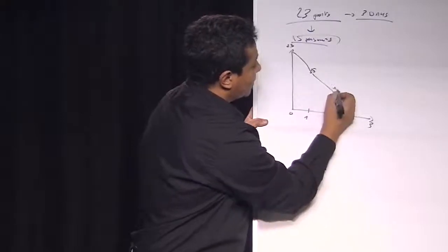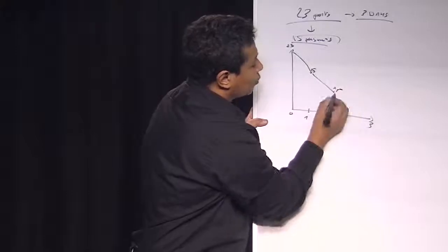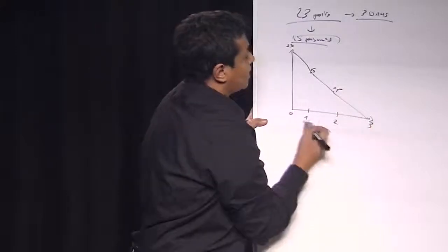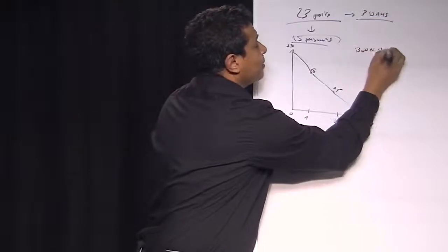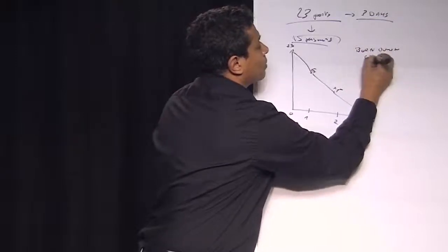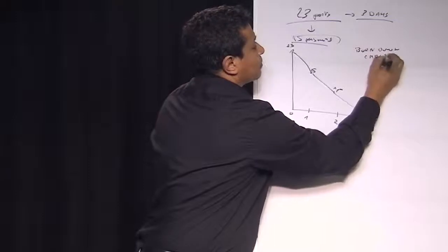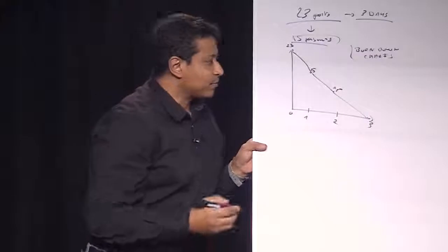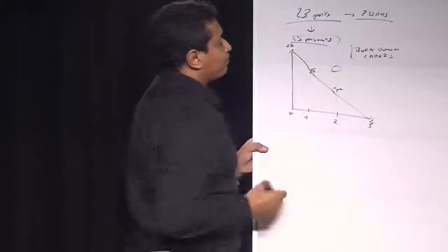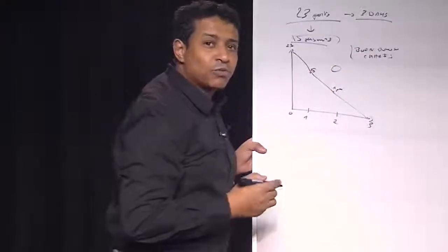Let's say 7 points, and I'm going to do the good job on the last day. Let's say 0 points. We call that a burn down chart. What can happen on a burn down chart? This is the ideal. This is what we dream about.